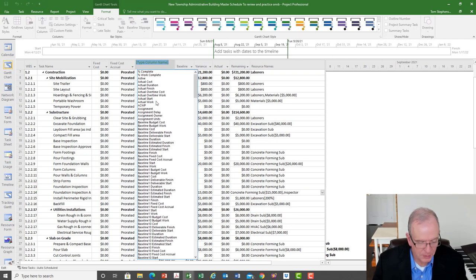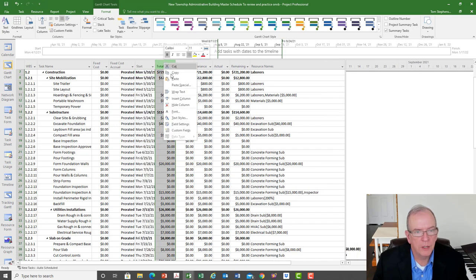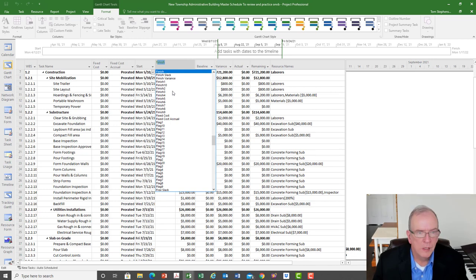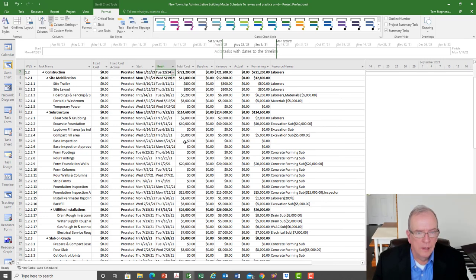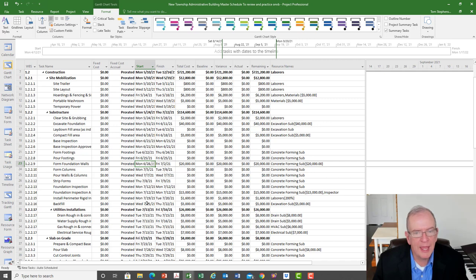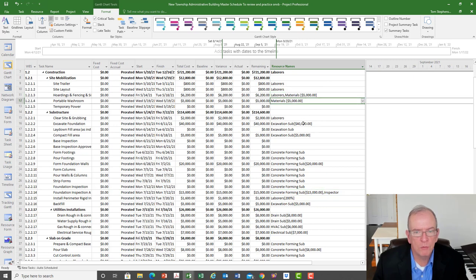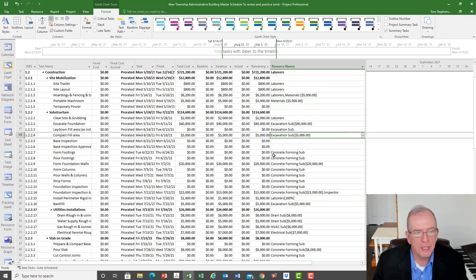We could also look at this from another perspective by inserting start and finish columns, associating costs with when we intend to pay the money out — either at the start or end of an activity. Timing is important: if we're going to pay money out, we have to pay it to a resource, and whoever that resource is, we've allocated money to them.